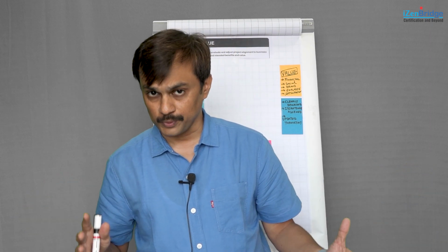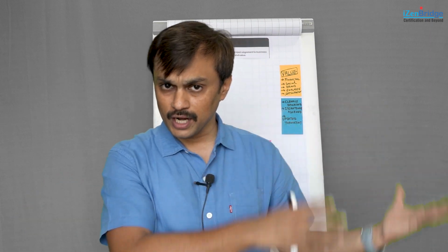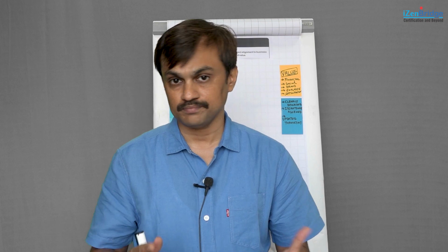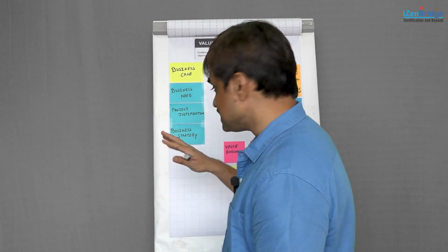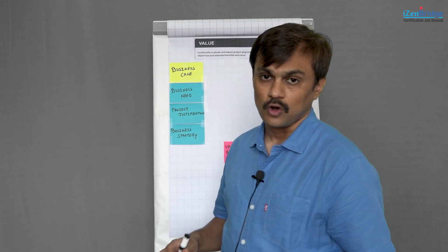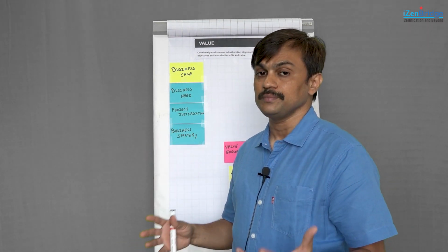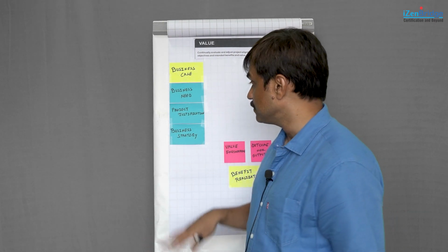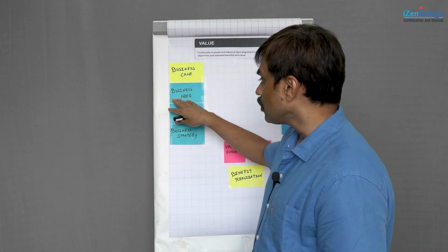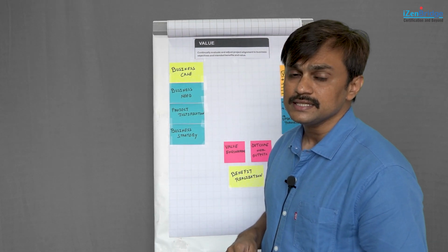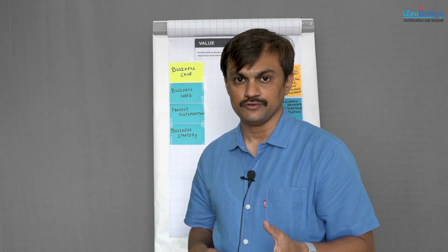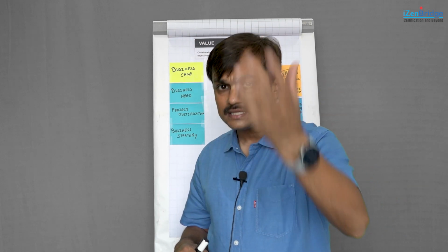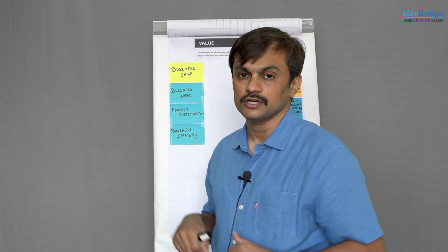If the project is part of a program, then you may have a business justification at a program level, and the project might be contributing to part of that business case or part of that value. In many cases, the business case may talk about what kind of KPIs will be used to understand whether the business case is getting materialized, and identify various business justifications. But in general, it will have three things. The first is business need. The business need is why we should have this particular initiative. What is the intended stakeholder need? What is the intended business need for having this project?